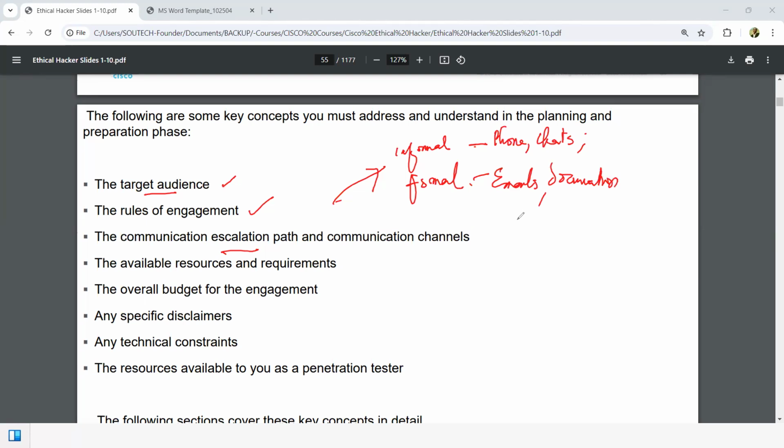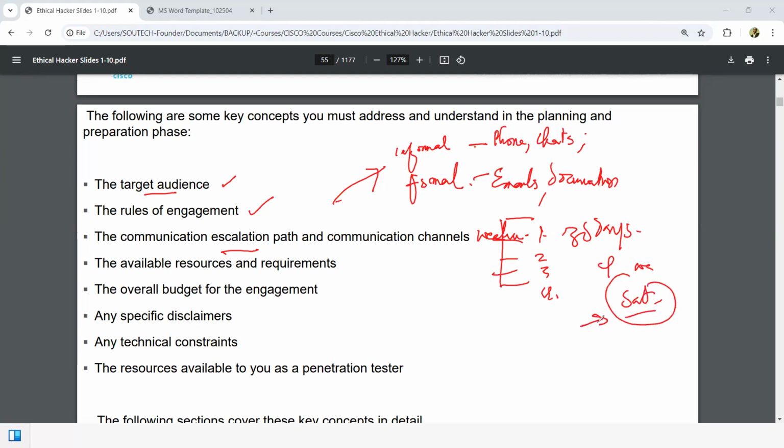If you're going to do a pen testing that's going to last for 30 days, the question is going to be, how are you going to communicate? Is it every weekend? So that means you're going to communicate 4 times during the period of the pen test. If it is already in the plan that communication is 4 times, that is every weekend on a Saturday, everybody's going to be looking up to Saturday for our communication. And if something goes wrong or we cannot get to the team or there are some things we have issues with, how do we escalate? Who do we talk to?